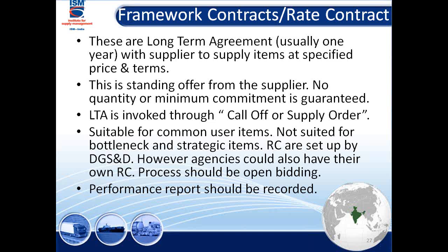Now this is more like a standing offer, more like an umbrella offer. And with the minimum commitment, the quantity, we then call off, or we invoke through a call-off contract. The word is call-off. Don't get bogged down with the word off. Off does not mean offing. Call-off means I'm starting by invoking it. So this is used for common user items, not suited for bottleneck and strategic items.